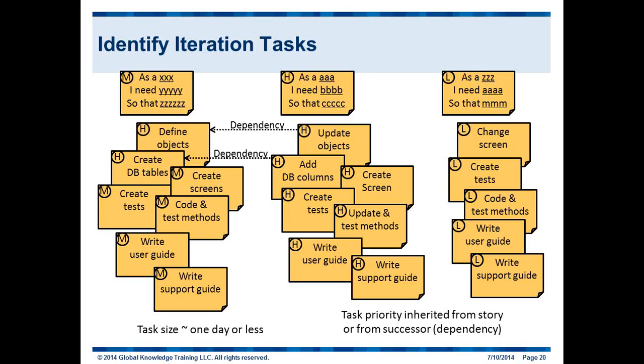And when I coach my teams, I always like to ask them, what would you rather? Would you rather have 5 stories that are all 80% complete? Or would you rather have 4 stories complete and 1 story not started at all? I'm hoping you're saying the latter, because the first example, 5 stories, 80% complete, if they're all 80% complete, I can't do anything with them. By contrast, if I have 4 stories that I can put into production, and that 5th story just, for whatever reason the team ran out of time, I've at least created value that the business can use.